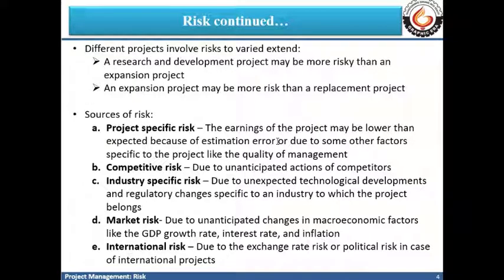You typically might have forecasted demand, which is based on some modeling, and there are some estimation errors associated with that modeling. Because of that, the earnings of the project might be lower than expected. The quality of management of a project also impacts the level of earnings. These kinds of risks are categorized as project specific risks.